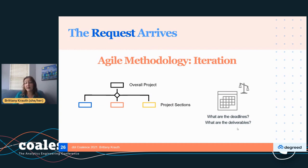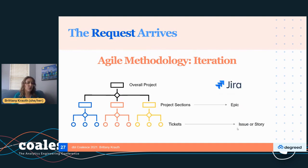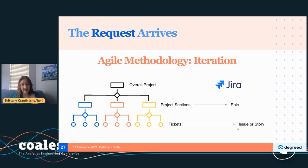Agile methodology is something your analyst is probably not very familiar with, but they're probably already doing it a little bit. I'm just going to focus on sprint work and iteration — taking an overall project and splitting it into smaller sections. We might say, hey, I know you want three dashboards, but we're going to do one at a time. We break projects out through JIRA into epics — maybe a section, maybe a version one and version two — and then break each epic into individual tickets and issues.